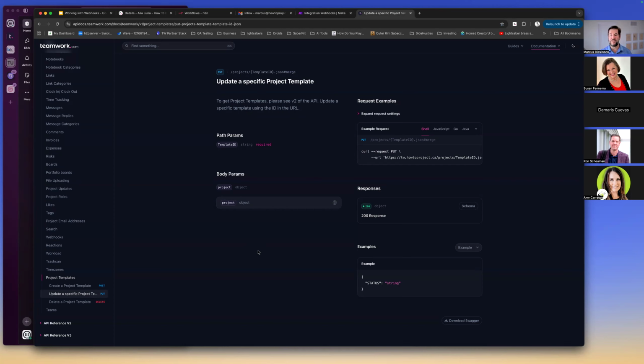And if the last activity was task created, then, if we know exactly what we're expecting, and in your case you know exactly what you're expecting, then I could actually say, take that task and make a loop. So I would say get every single project that is active. So always filter by active. I made that mistake once. I would say get every active project on this Teamwork instance and now create a loop and just copy that task again and again and again and again.